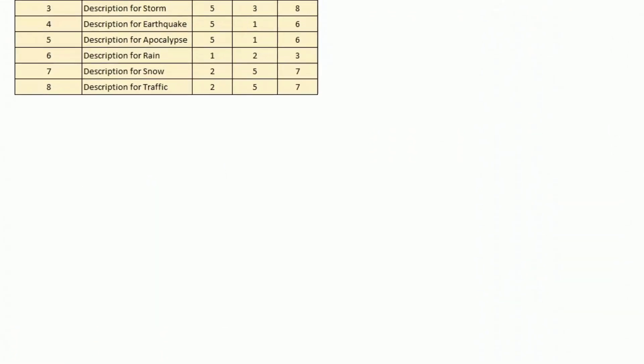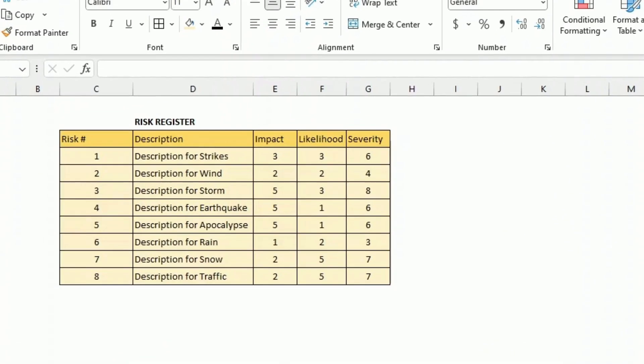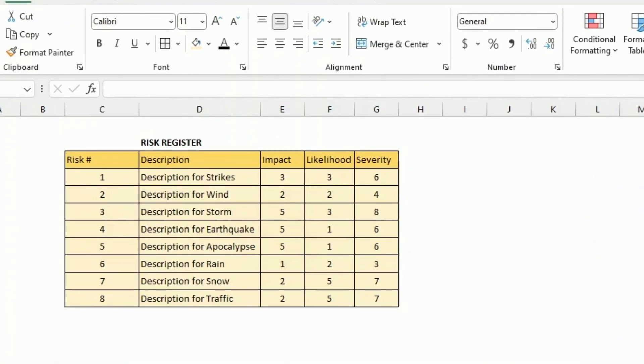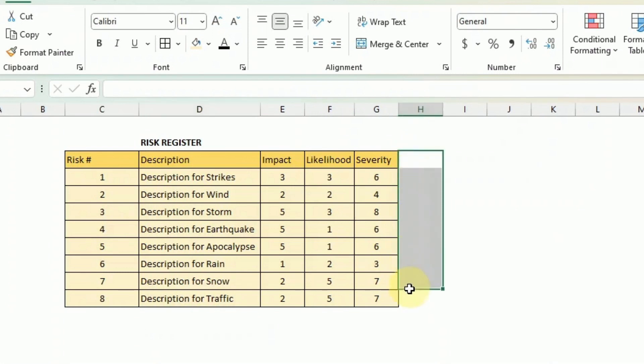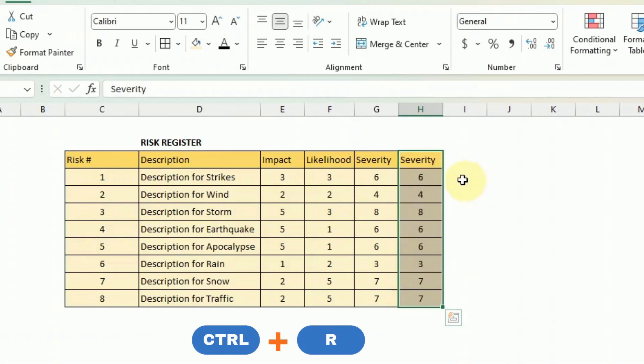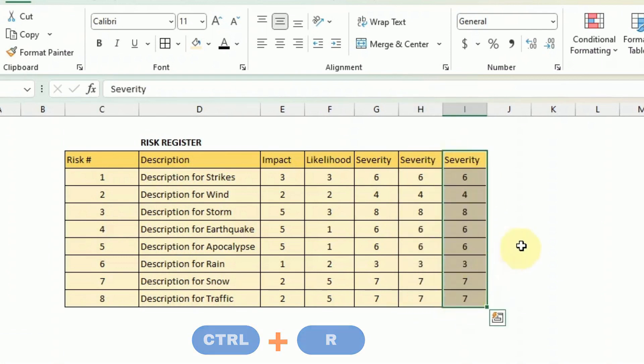Now I have created a very basic risk register with a risk number, the description, an impact and likelihood and a severity. So this is really the minimal amount of fields that you need but I want to add two columns to it. You can use the control R trick - you just highlight those cells and you press control R so that should bring the value of the column from the left there.